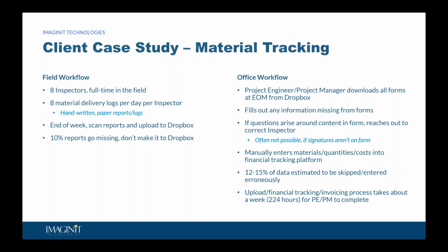After the upload, the financial tracking and the invoicing process, all of that takes about a full week. That's roughly, as we're going to see on the next slide, about 224 hours of effort that this PM is spending every month to complete this task. That's a ton of time that is not being utilized for fun stuff, just basic admin stuff that I think we can streamline with some tools that I'm going to talk about in a second.